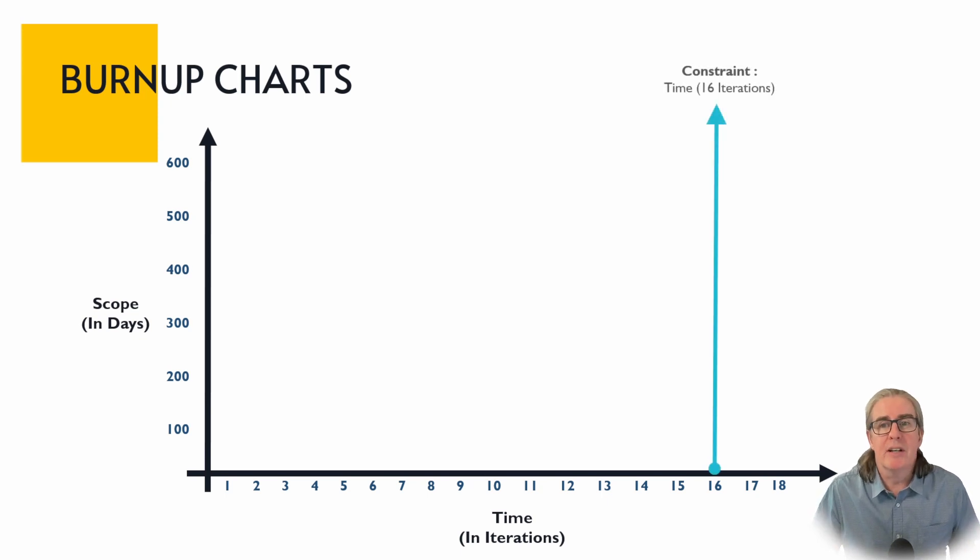In this project we've got a constraint of 16 iterations. Maybe this is two-week blocks so this is going to be 32 weeks. This is an eight-month project. You know that timescale for what needs to be done is around that sort of eight months. You've got a constraint of around about 600 days. You know typically that's the amount of work that you expected to come through the pipeline here. So with these two constraints in place then what you do is you start to work through the backlog that's there.